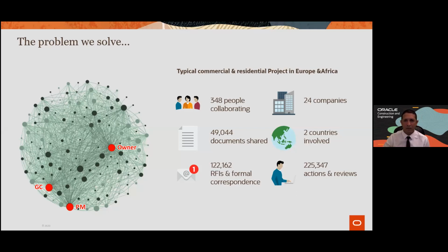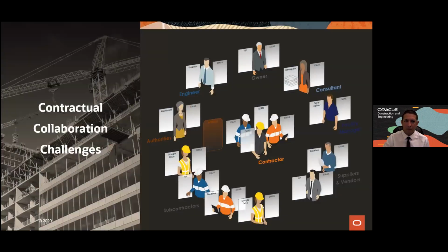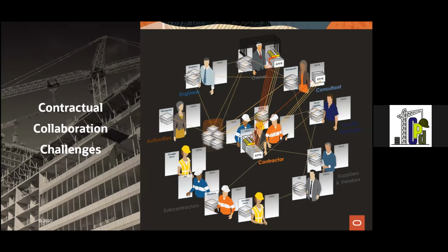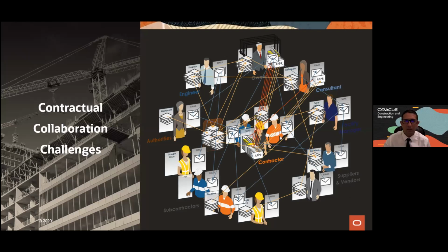Having found a baseline for the data, we also know that in most construction sites, companies usually have two systems. One is for correspondence, and one is for the actual data repository. So a contractor may send an RFI to the owner, and because the file might be 30 or 50 or 60 MB, the contractor will split that email into several files so that the mail server does not block that drawing.